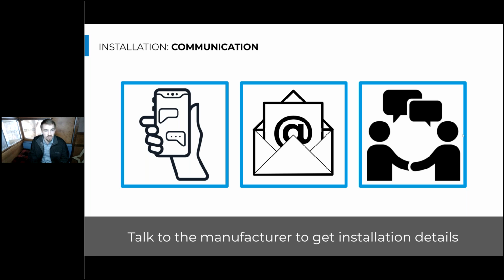Any questions that aren't answered through the manufacturer's documentation or the webinars or any communication you've had up to this point regarding installation should be asked now. Lastly, make sure the rep or the manufacturer are aware of your installation timeline, so they can make sure someone's available on D-Day when this stuff's going in and some questions will inevitably come up.